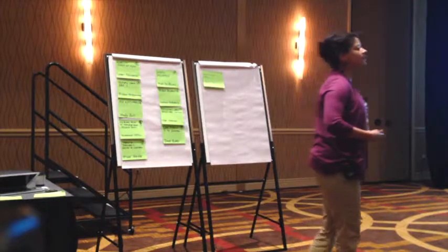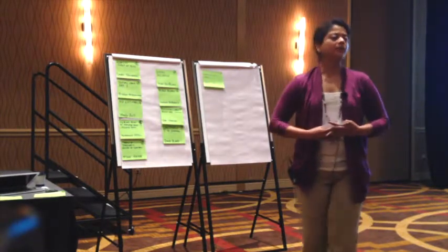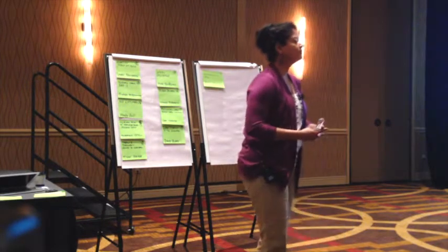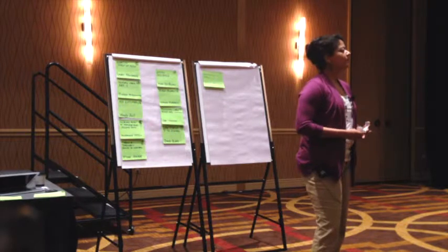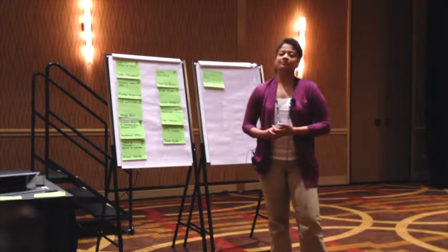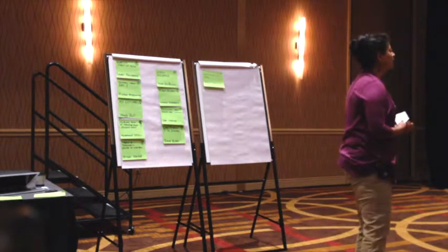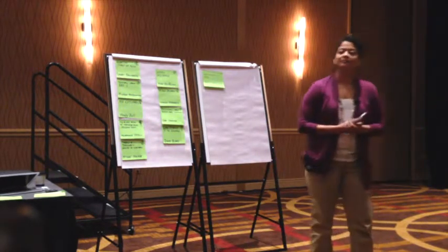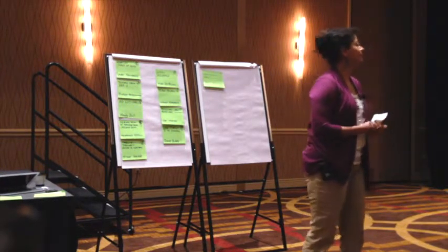Technique number three, creating a testable task list. How can we do that? What do I mean by that? During the sprint planning meeting, once the team decides what the goal is, two things will happen. The team is going to decide on what they are going to be working on, and the second part is how they are going to be doing that.